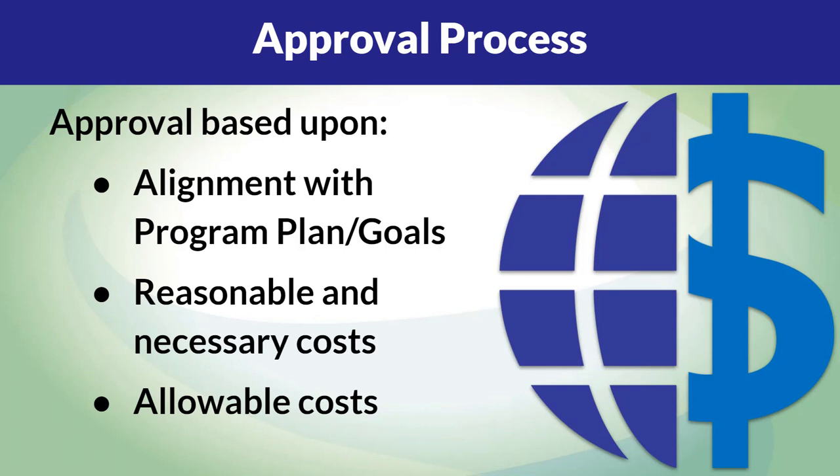If the proposed budget changes adequately reflect the site's program plan, your CLC liaison will then review the rationale and line items to determine that the proposed revisions are reasonable and necessary. For example, if there is a proposed increase in salaries to lower the staff-to-student ratio in the program, with the intention of providing more opportunities for youth to build positive non-parental guardian relationships, a DPI consultant will likely approve this change.